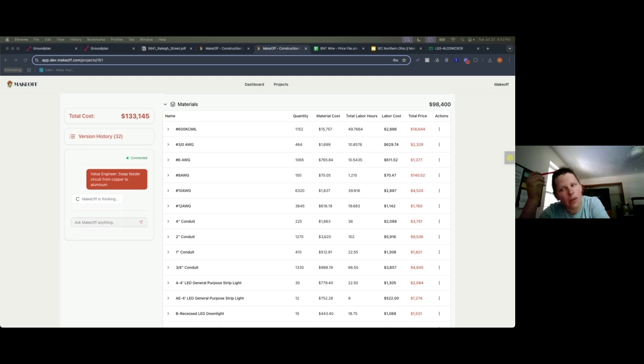When I was working with Accubid, it had an integration with that too. They had like 3 places set up. This was in Milwaukee, so it was Viking Electric, Gray Bar or CED, and then if they didn't have it, they'd go to market price, and it would display market, and you could see, okay, this is cheaper at Mars, this is cheaper at Viking, this is cheaper at CED. We couldn't find this anywhere, so we just went with market price, and that's how Accubid did it, but it was a little wonky.